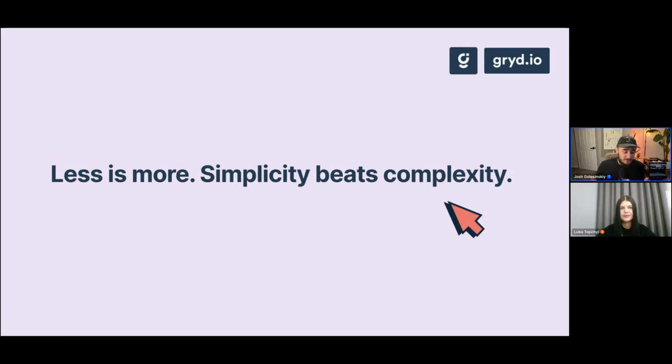Number one, things are just less prone to breaking. Like you're not going to be breaking a workflow that is to do, in progress, and done. That is a very hard workflow to break. Whereas if you have a lot of complex transitions, 20 to 30 statuses with validators, all that kind of stuff, and you make one small change, that could cascade and just break everything in the entire workflow. So the simpler something is, the harder it is to break it.